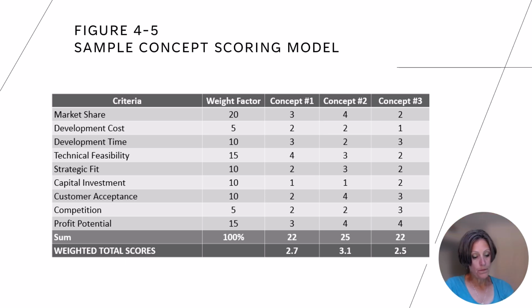Weighted scoring model. Deciding which of the many product concepts generated in Stage 2 will move forward to full prototype testing and technology development is not always straightforward. Often several different concepts can deliver the customer benefits and align with the organization's innovation strategy. Customer feedback is sometimes disjointed and inconsistent. A weighted scoring model yields a comparison between leading product concepts with criteria ranging from customer acceptance to product cost. Not surprisingly, the scoring model borrows many of the criteria for which gatekeepers evaluate new product projects.